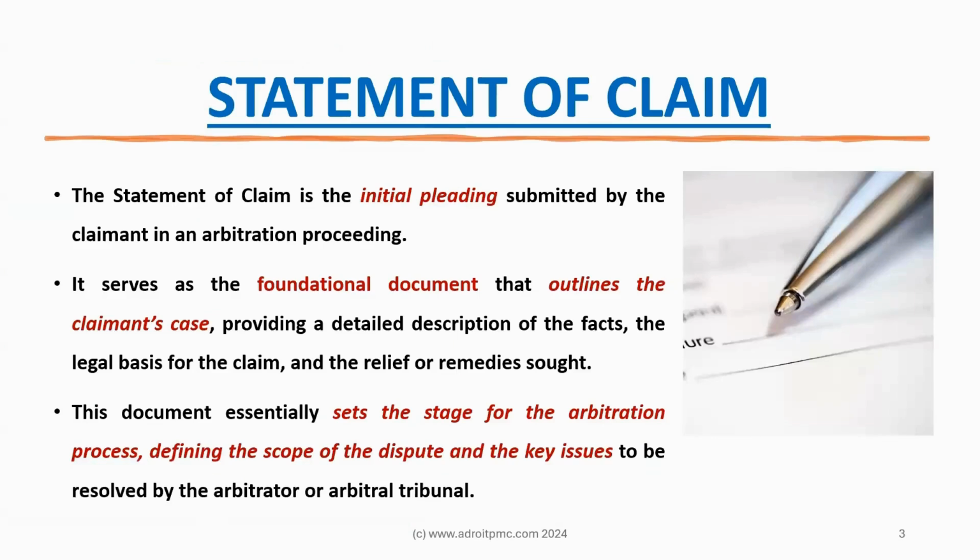Before going into the pleading submission and invocation of arbitration, the claimant has to make sure that he has a complete set of documents and evidence which he wishes to refer to in support of his claim. If it is a construction dispute or any kind of dispute, the contract agreement is mandatory, and it has to be duly signed and sealed by the authorized person.